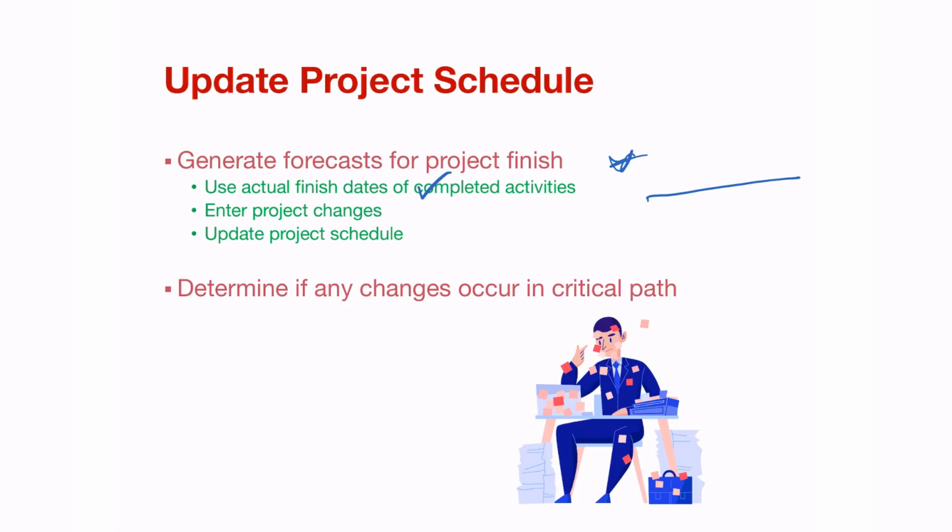So you've got the plan running on one side, and then you have your actuals running next to it in order to compare constantly. If we said that we're going to be on day 20, on day 10, where are we actually? And constantly update the project schedule.